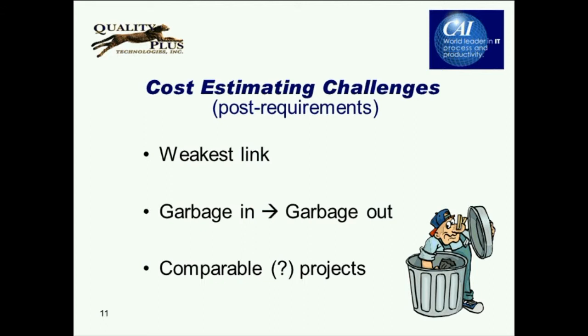It depends. As long as you know who was in the corral, did it include management? Did it include project management hours? Did it include trainers? What did it include? That's one of the dimensions. We need to know who is in the corral if we're going to compare similar projects in terms of hours or in terms of cost.